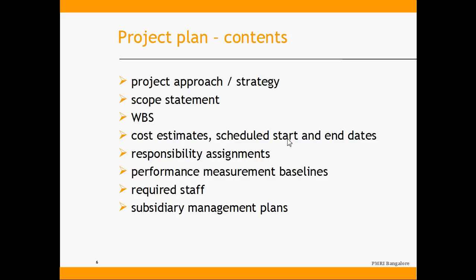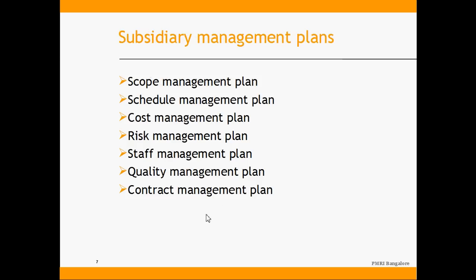Further contents include: cost estimates, schedule start and end dates for major activities, responsibility assignments, performance measurement baselines — such as allowed schedule variance, scope variance, and cost variance — and required staff. We also call it a ramp-up and ramp-down plan, since team size starts small, grows as the project progresses, then reduces at the finishing stages. Finally, subsidiary management plans must be documented: scope, schedule, cost, risk, staff, quality, and contract management plans.